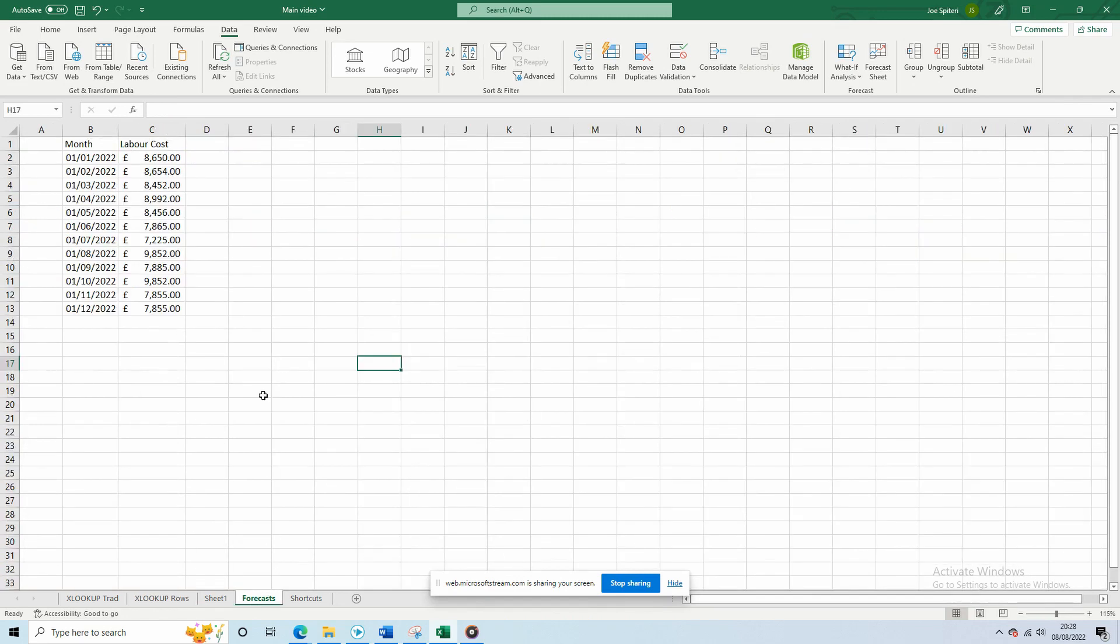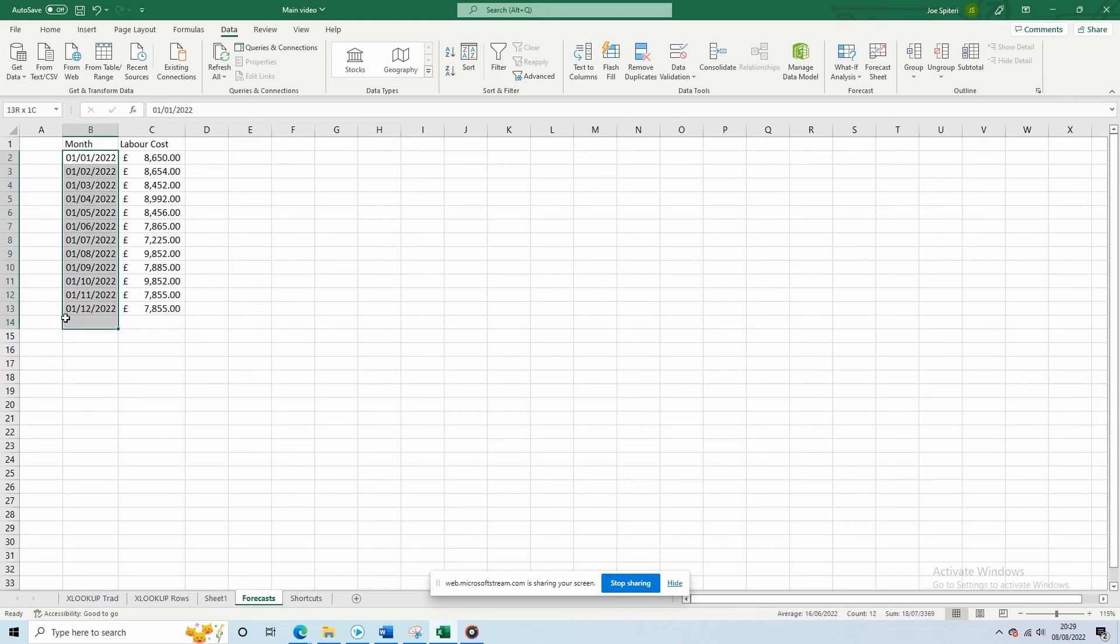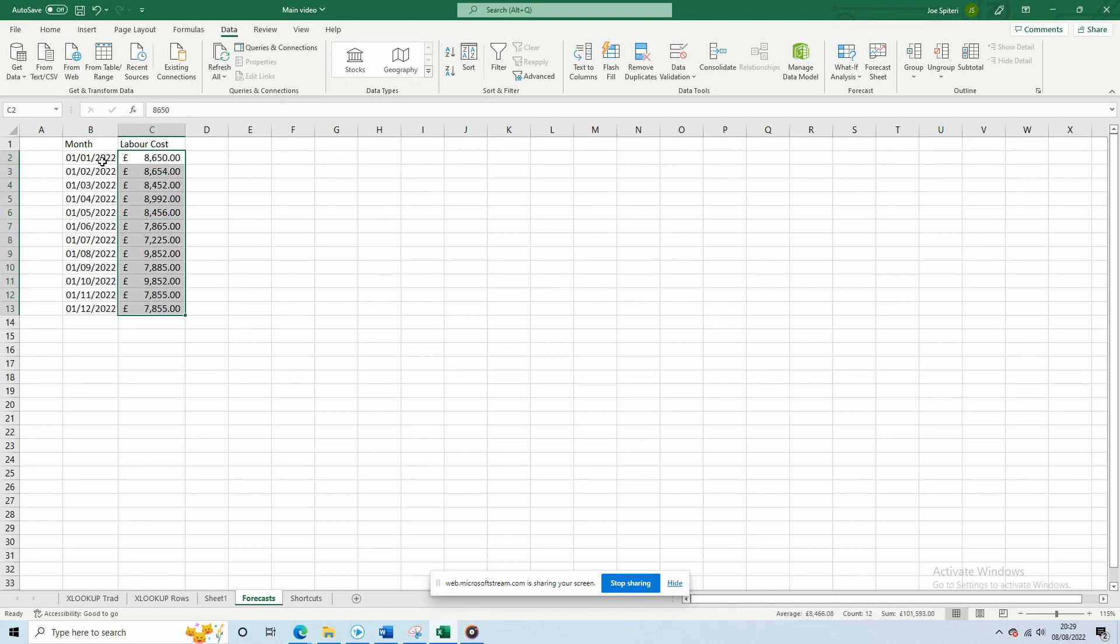Forecast Sheet. This is a great visual tool when completing CVRs or forward forecasts, and it's simple too. Let's give the example of the monthly labour cost on a project. Here we have a list of months, and here we have the monthly cost of labour. We want to estimate the cost for the next 4 months.